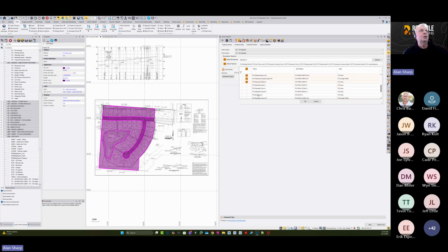So it flags all the ones that you checked as a feature that says you want to do the subgrade or the earthwork sub-quantities underneath each one of these. And each one of these will become a line item of its own. So I said all the building pads, the sidewalks, the pavement areas, the pond area, I wanted those as areas reported individually. So if they're getting reported already individually, you don't need to create a second phase boundary for them. If you do that, it will subdivide the quantity.